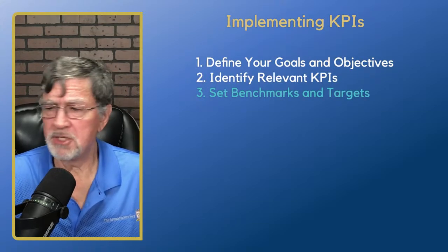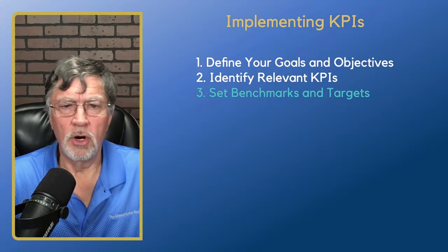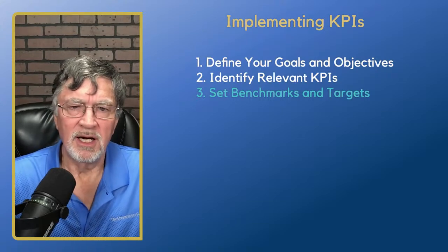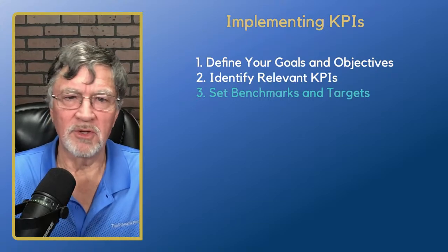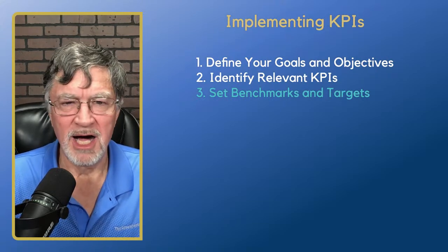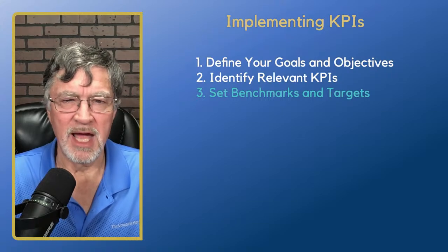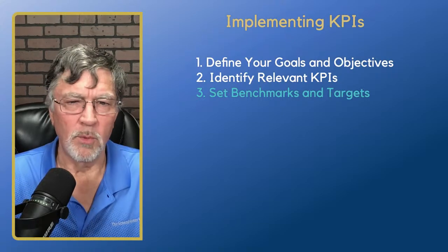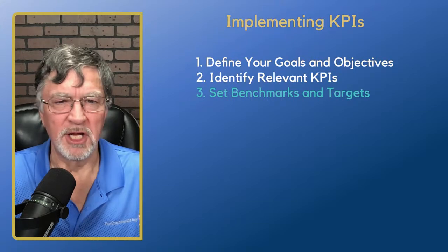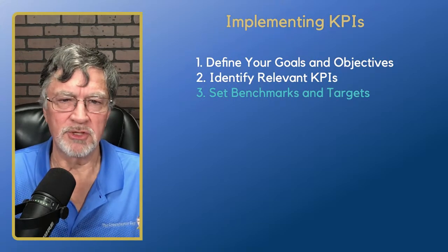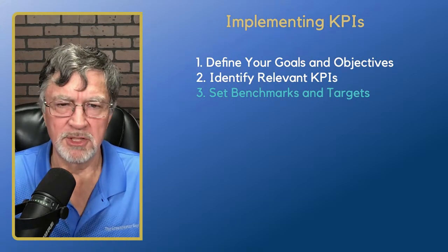All right, set benchmarks and targets. So, for instance, once again, referring back to the water wells, where we do this a lot, what benchmarks and targets do we have that tell us we're getting to where we need to do well rehabilitation within the next year or so, so we can make sure we have that appropriately budgeted for?